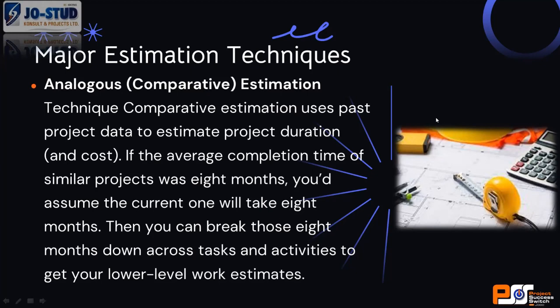But this one helps you to just say, so that you don't waste time deploying resources only to discover that you are not able to. For example, if you have paid a QS and they have done some kind of professional works and probably you discover that something that you just have maybe 500 million is costing 2 billion, you have just sunk some cost. But if you have an experienced manager who gives you an analogous idea of it, you can say, oh yes, why not? My pocket can take it. I should be able to embark on this. So that's actually the essence.